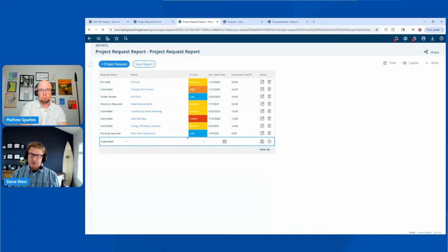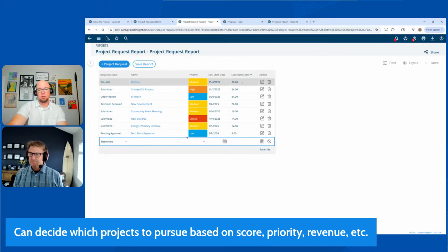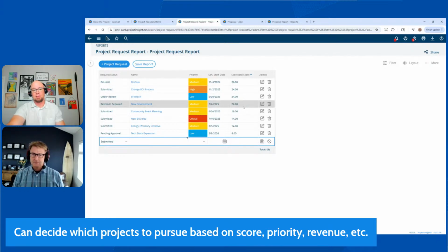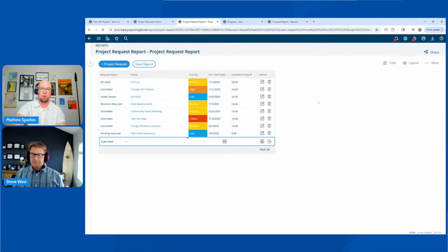And that's what the scorecards are for. Again, those are what your questions might be because every organization has different priorities. One of the other things that's nice about the scorecard functionality here is you have the ability to say, we're not even going to look at anything unless it's above 20. That way it's really clear to know what you're going to prioritize.